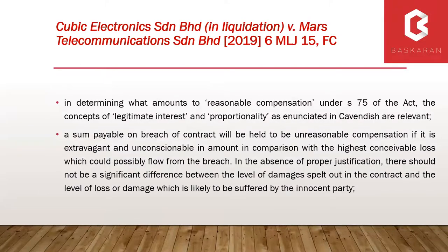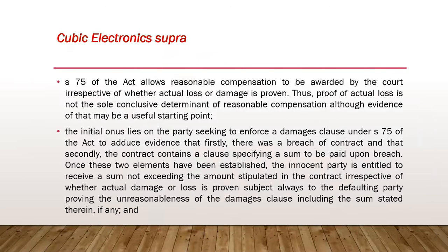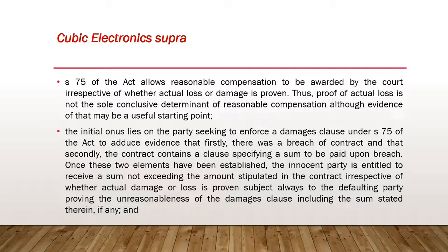That previous position recently changed with the judgment of the Federal Court in Cubic in 2019. Essentially, the onus of proof has shifted. All that is required for the employer now is to prove: first, that there has been a breach of contract; and second, that there is a liquidated damages clause in the contract. With that, the employer would be entitled to recover liquidated damages. He is no longer obliged to prove actual loss — the onus shifts to the contractor, who must prove that the liquidated damages specified in the contract is unreasonable.